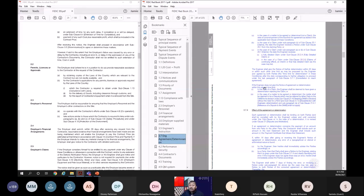If the engineer does not give the notice of agreement or determination within the relevant time limit, okay, what will happen? Now 42 days have elapsed, and the engineer has not given anything. Now if it is a claim, the engineer shall be deemed to have given a determination rejecting the claim. So if it is a claim, and the engineer has not given anything within 42 days, that means the claim has been rejected. But if anything else,